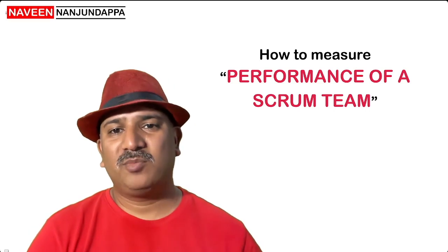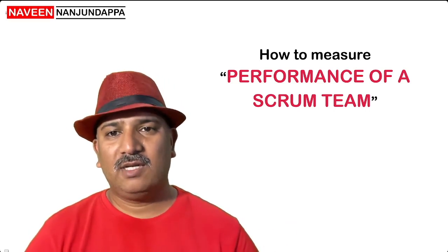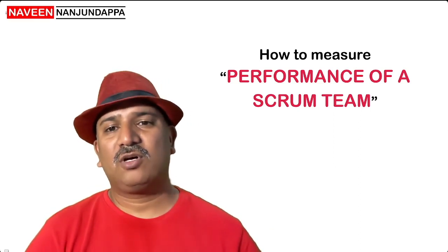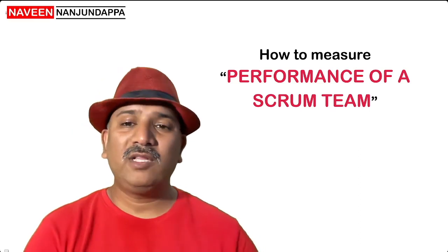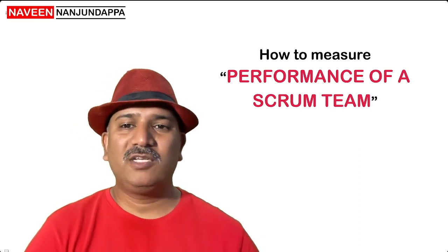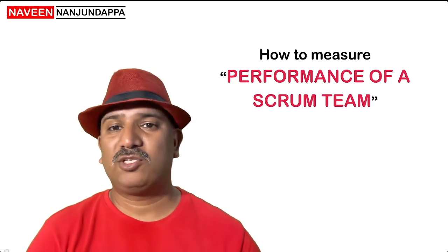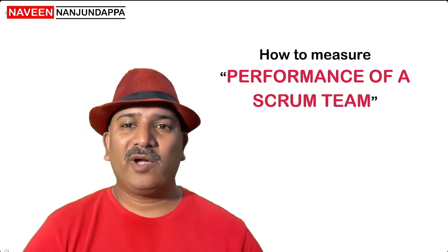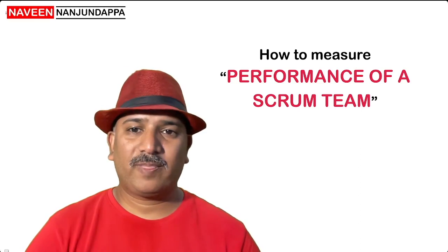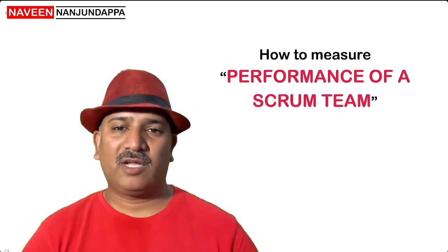It is an average performance of the team over a period of time. It's a statistical average. Similarly, the velocity can only be considered as an average to forecast on a release note rather than holding the team accountable for its absolute performance. So velocity is the most popular way to measure the performance of a team, but it can be completely messed up, misused. So, do I advocate a velocity-driven measurement of purpose? Probably not. And my guidance is, even if you want to measure it, use it very similar to the cricket score's run rate.